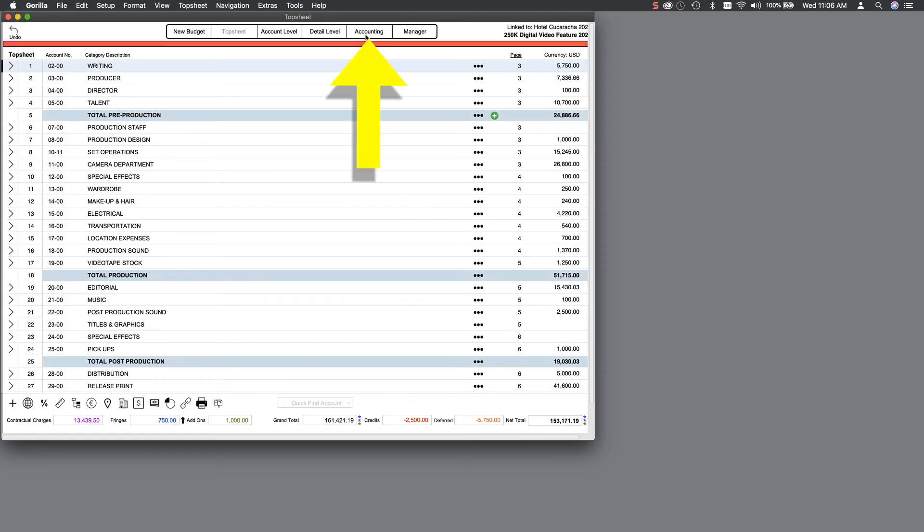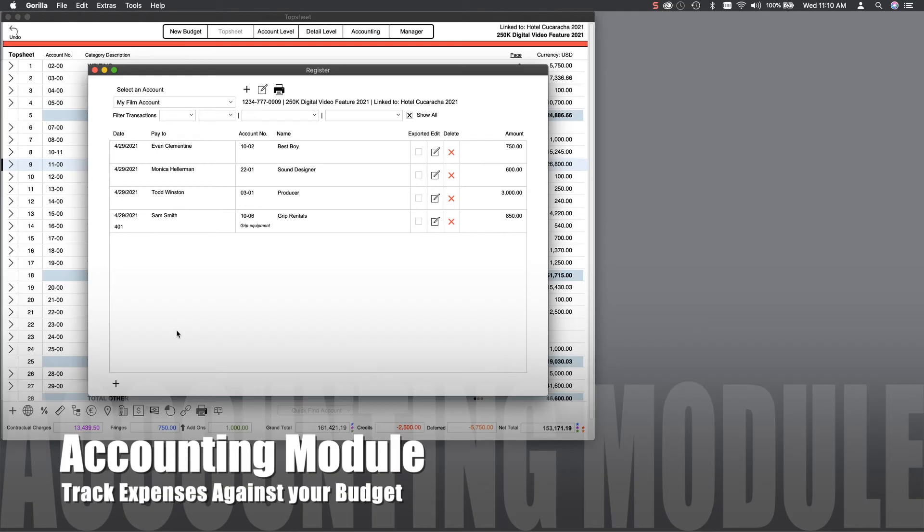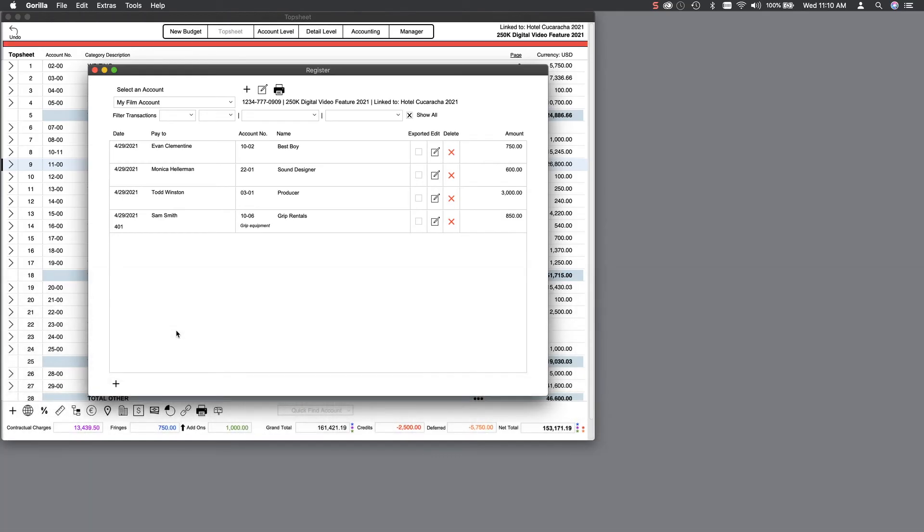The Accounting module allows you to track expenses against your budget. Click on the Accounting tab and create an account. Again, if your budget is linked to a schedule, you can enter payment transactions to your cast and crew and track the amounts paid against what you budgeted for that line item.